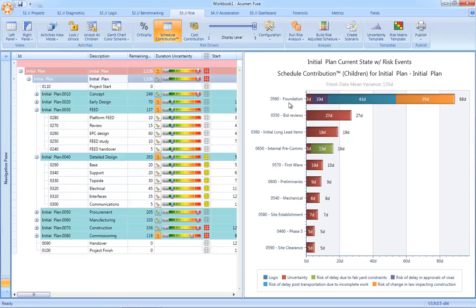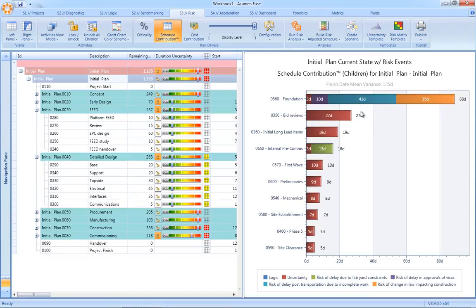By detailing out the tornado chart, we can see not only which activities are the risk hotspots in our schedule, but within those activities, how much of that risk exposure is being driven by logic, by uncertainty, or indeed specific risk events themselves directly from the risk register.